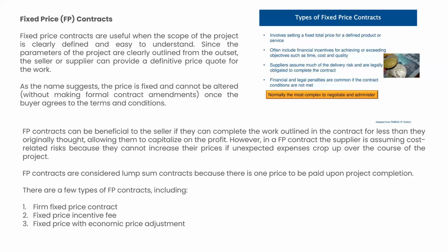It may be good for the parties or it may be bad for the parties. For example, if the prices rise, it's bad for the supplier but good for the project team. In the other way, if the prices go down, it's bad for the project team and good for the supplier. So either way, sometimes it works out.